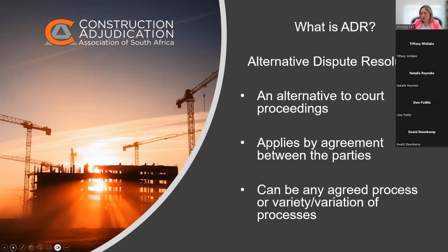But just to start with, what is ADR? It stands for Alternative Dispute Resolution. What it really means is anything that isn't court proceedings. So it has to be agreed between the parties. Court proceedings apply by law. Anybody can refer a dispute to court proceedings unless they've agreed another alternate dispute resolution mechanism.